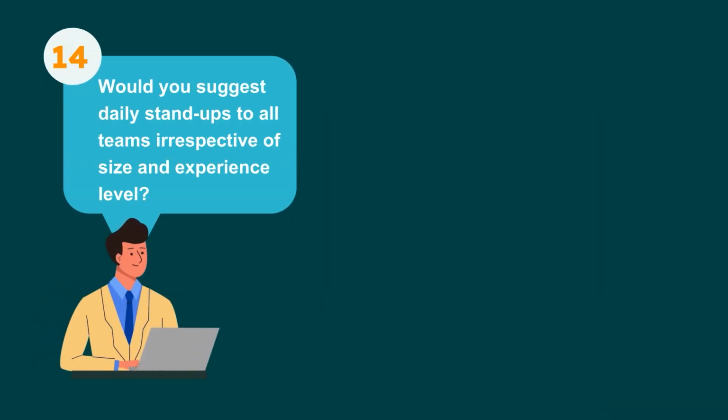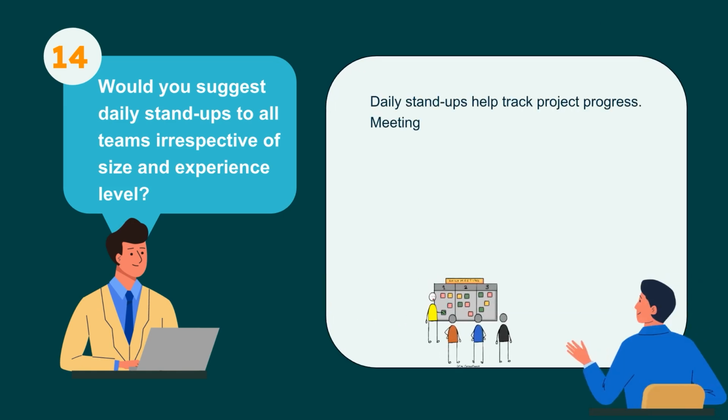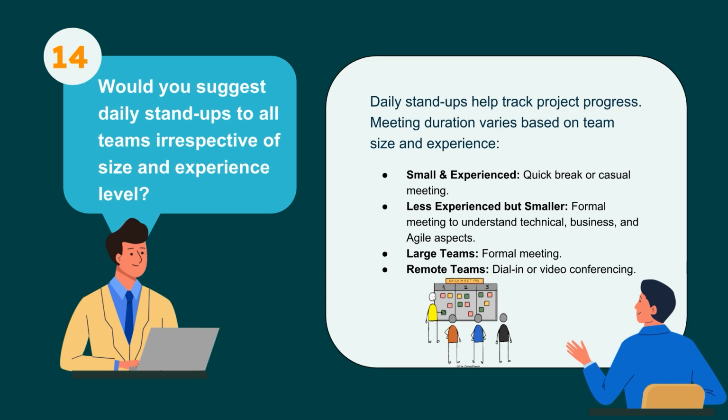14. Would you suggest daily stand-ups to all teams irrespective of size and experience level? Daily stand-ups help track project progress. Meeting duration varies based on team size and experience. Small and experienced: quick break or casual meeting. Less experienced but smaller: formal meeting to understand technical, business, and agile aspects. Large teams: formal meeting. Remote teams: dial-in or video conferencing.